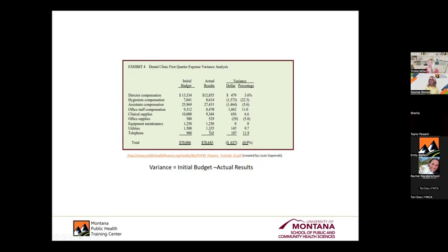And when we look at the actual results of what we spent, we see that we're over. Now, by about almost $640, give or take a couple. So 637, we're over 637. We say, well, that's not too bad as far as our $70,000 budget. But again, if this is only one quarter, if we keep doing this, we're going to be over a few $1,000s by the end of the year, right? So checking ourselves and doing this variance analysis will allow us to see how we're staying on track, right?